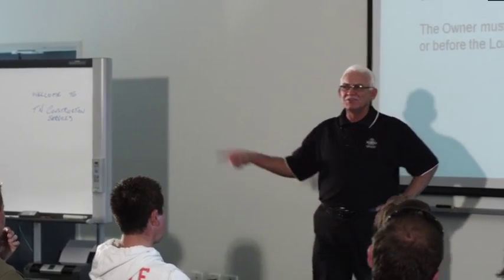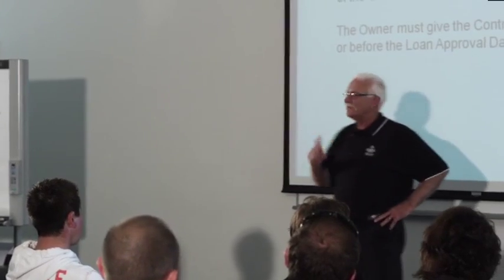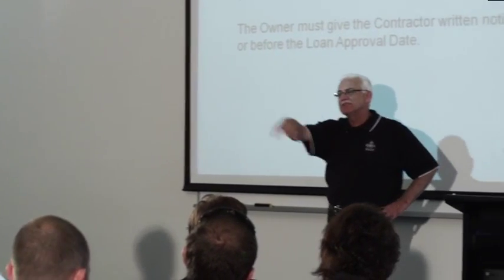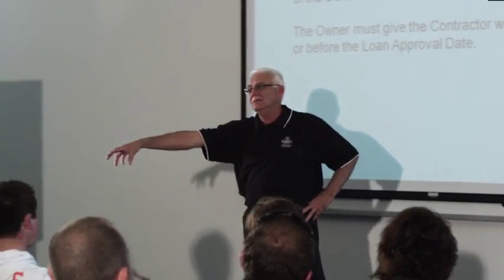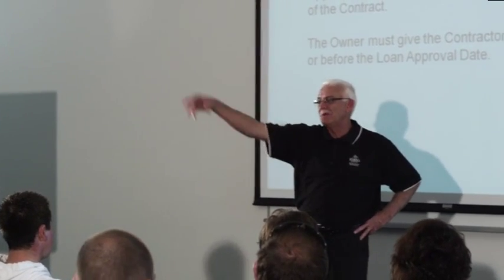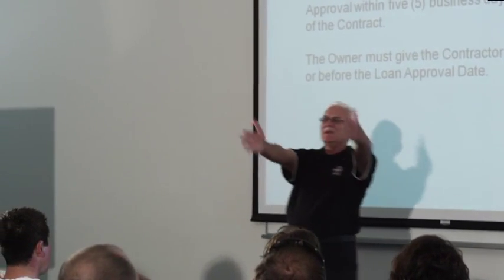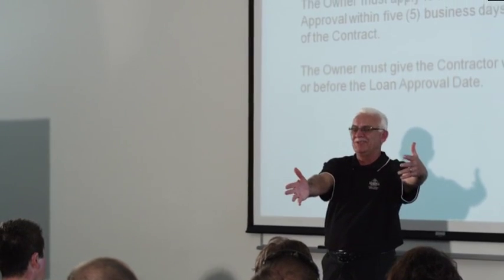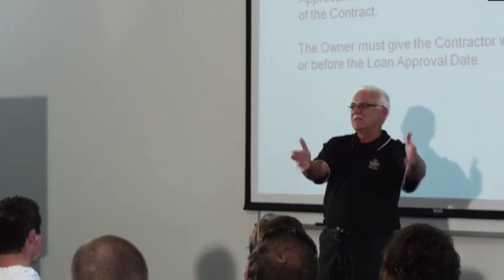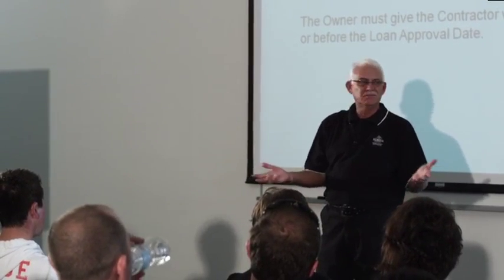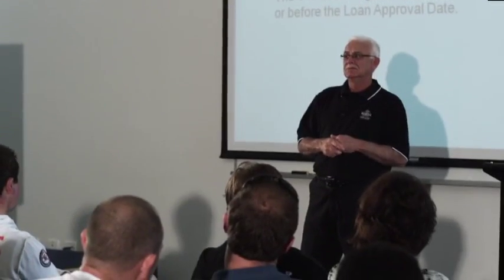Not only is that a variation of the contract, but you also have to think about this as well. How are you going to secure it? 15 grand's a lot of money. How are you going to secure that they're going to pay you at the end of the day? They've already taken out 100% loan from the bank. You can't do that now, I don't think. I think they only give 95 or something.